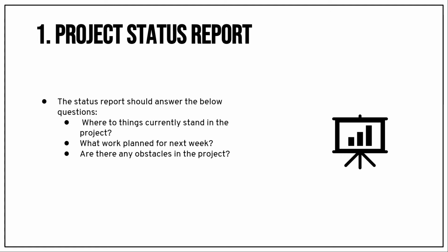The third one is, what are the obstacles we are facing in this project? It may be a resource problem or an environment problem. What are the integration-related problems? For example, the other team is not ready to integrate our code. What are the obstacles we are facing in the project?